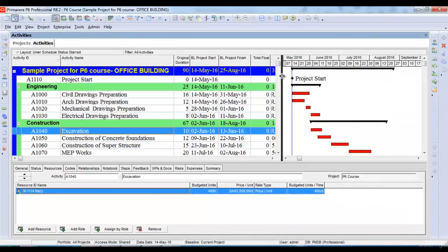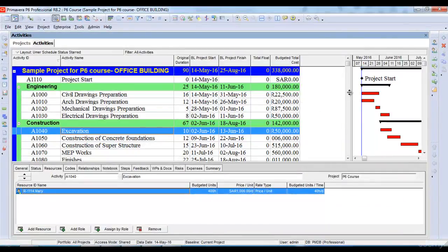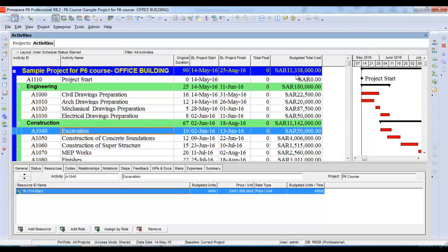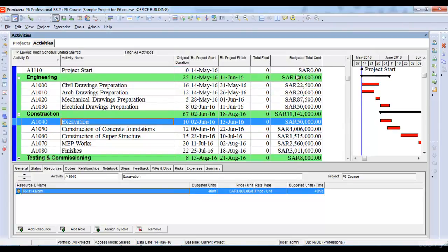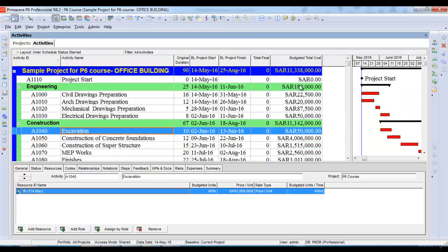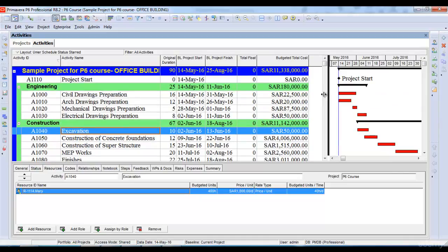This budgeted total cost column will be added to my columns, and I'll click apply. Once I click apply, I'll be able to see the total budget of my project here. It shows me the total budget as 11 million and 338 thousand. Similarly, against each activity, it shows the budgeted cost of each activity. In this way, I know the budget of my project.